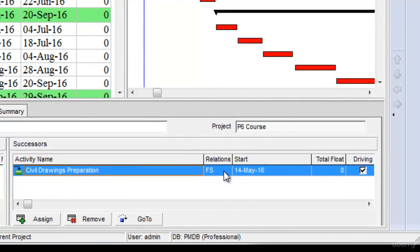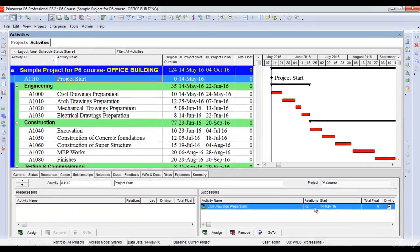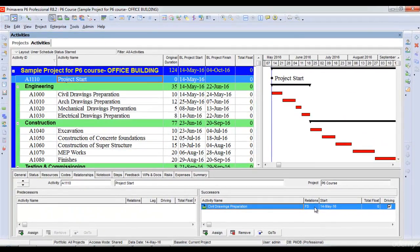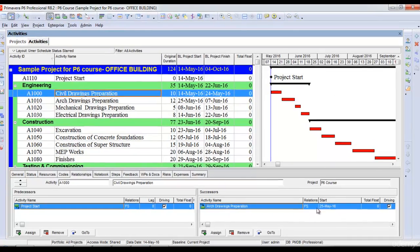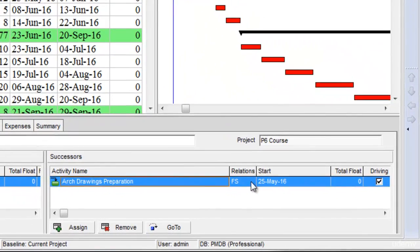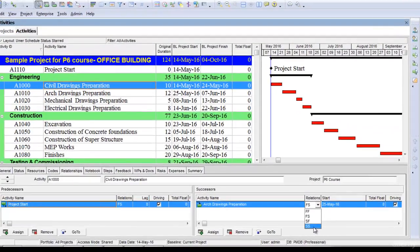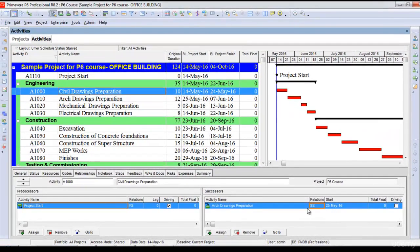I can change this relationship type to any other type. For example, if I want civil drawings and architectural drawings to start at the same time, I'll select civil drawings preparation, go to relationships, and change the relationship type to start-to-start.